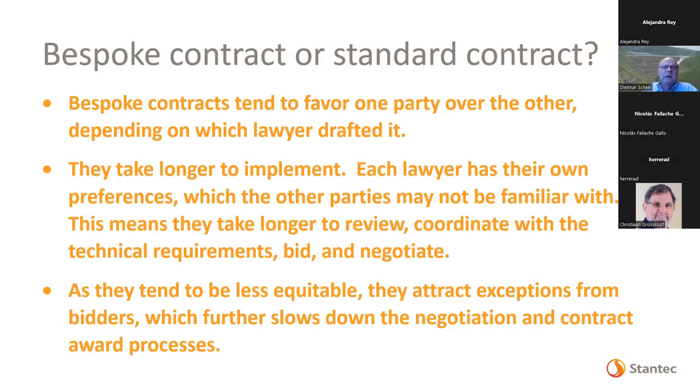And I've seen a project where it goes on for 6 months to a year, the whole negotiation stage, because somebody decided to go with a very custom contract. And also, as bespoke contracts tend to be less equitable, they attract exceptions from bidders, which further slows down the negotiation and contract award processes.